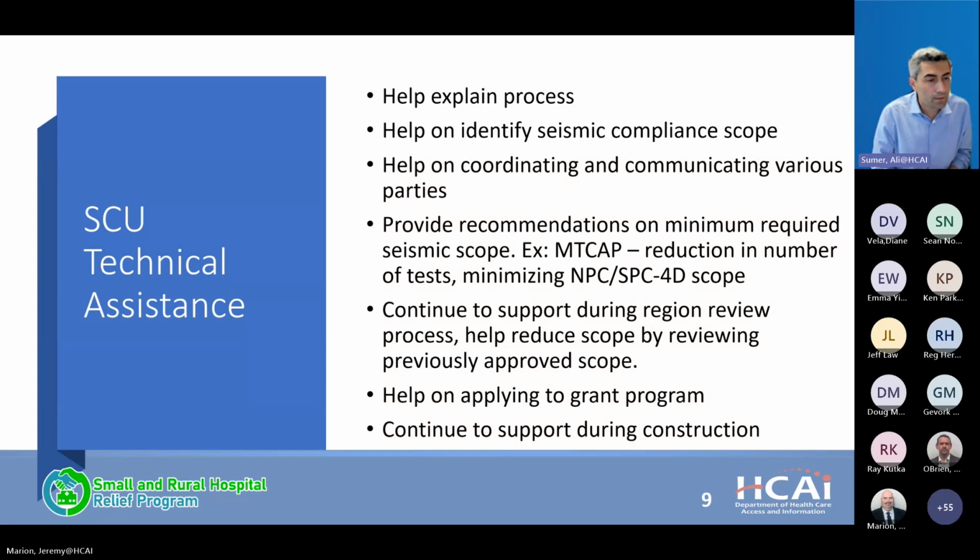For example, we had several examples about material testing. There might be 70 or 75 sample locations proposed. Just a few weeks ago, 75 sample tests got reduced down to 12. That's a huge savings on the cost of construction. Since we are involved in the early stages, we reduce the cost.